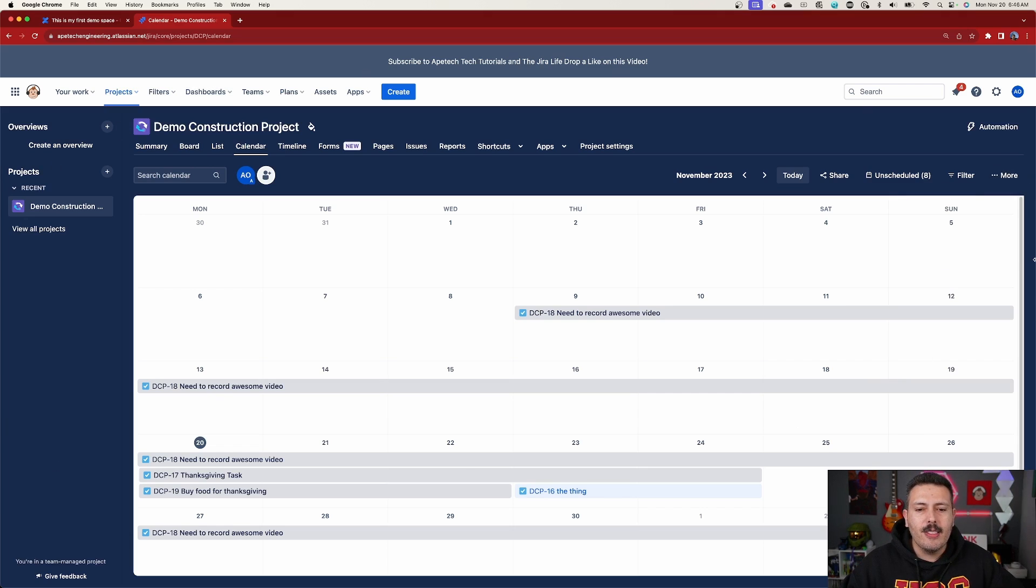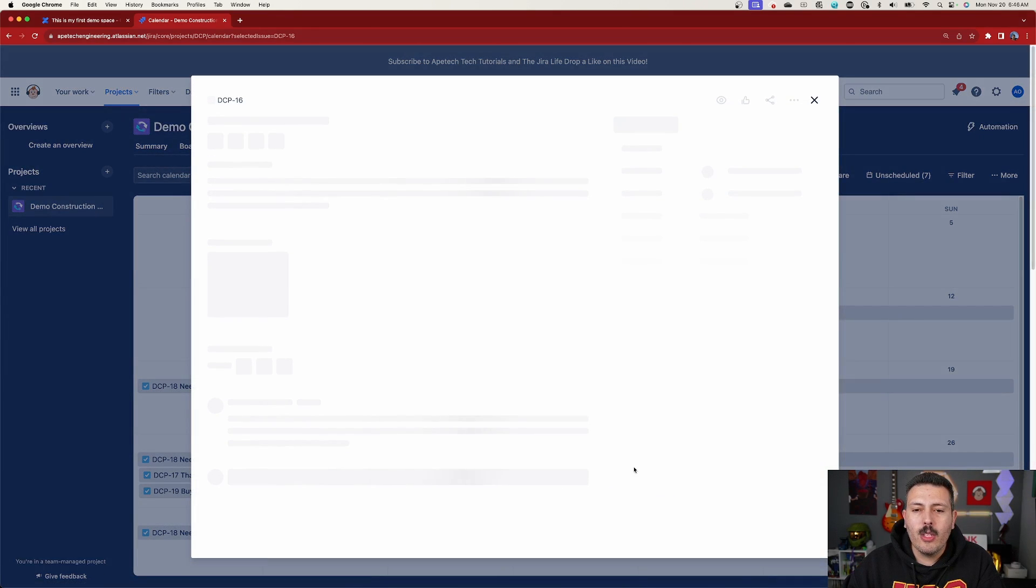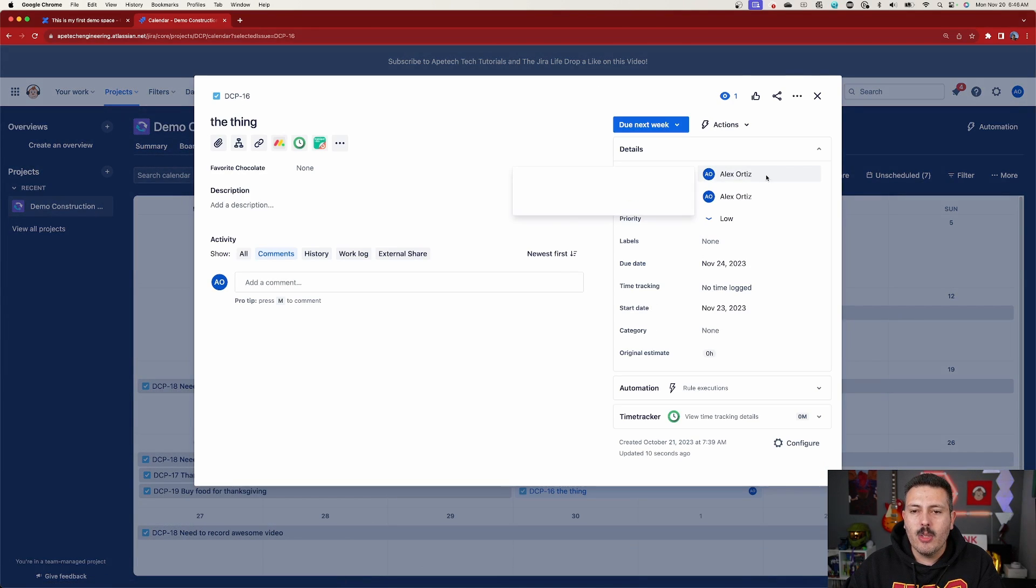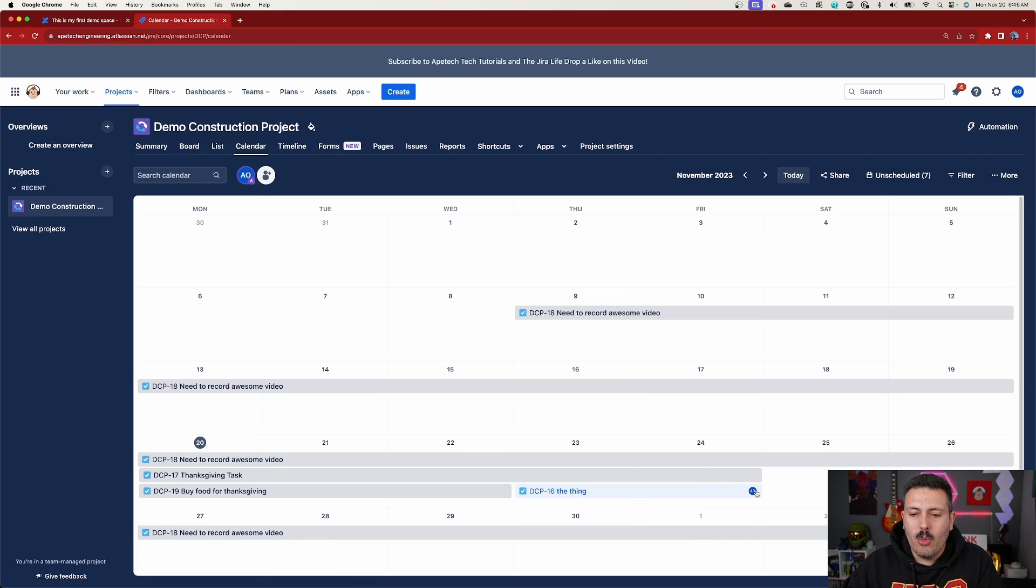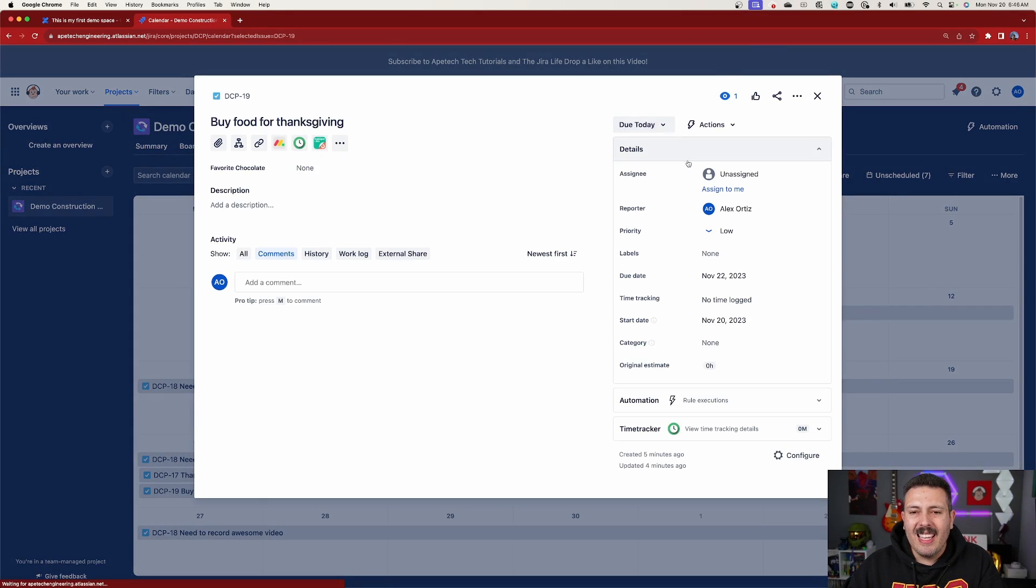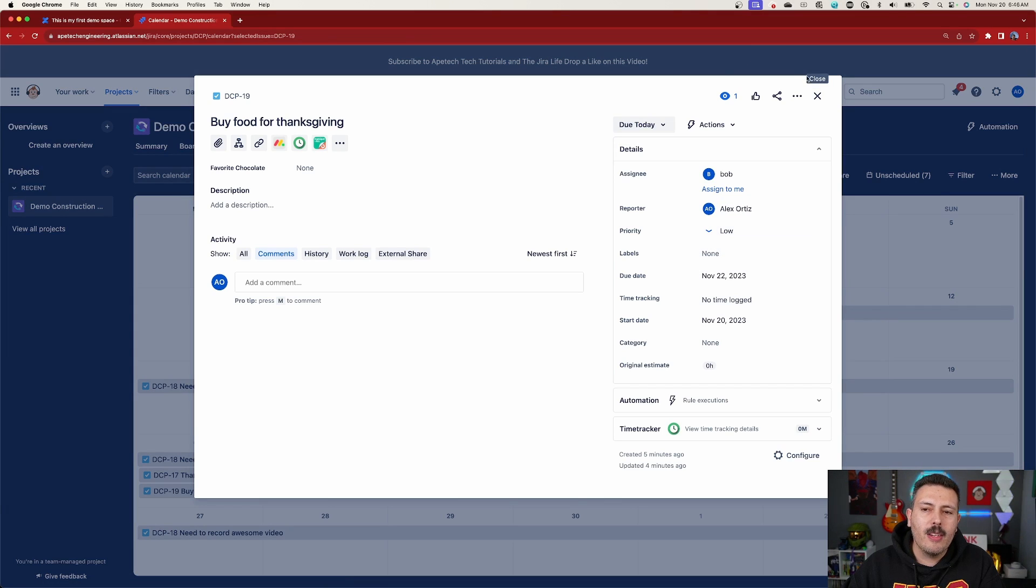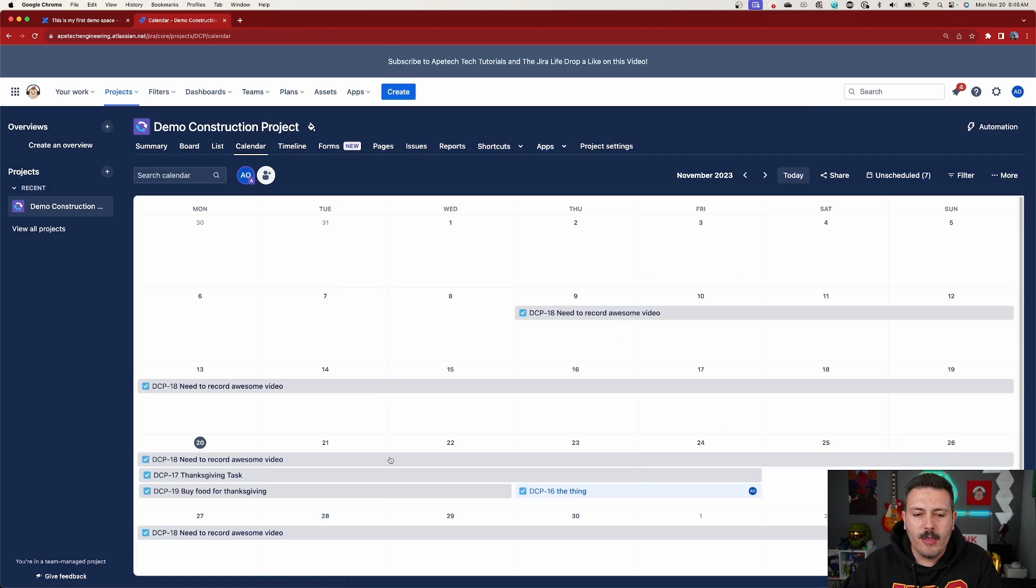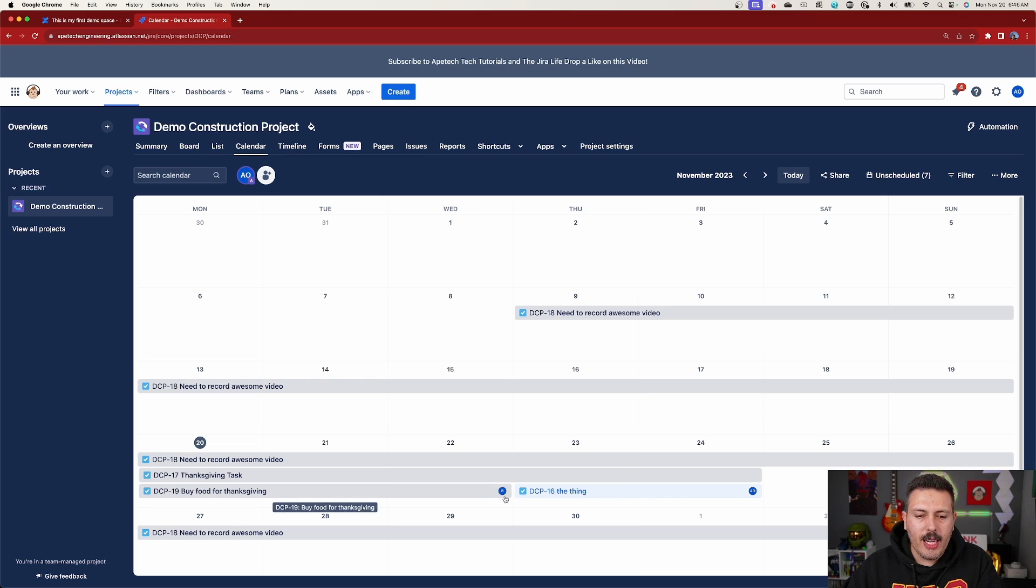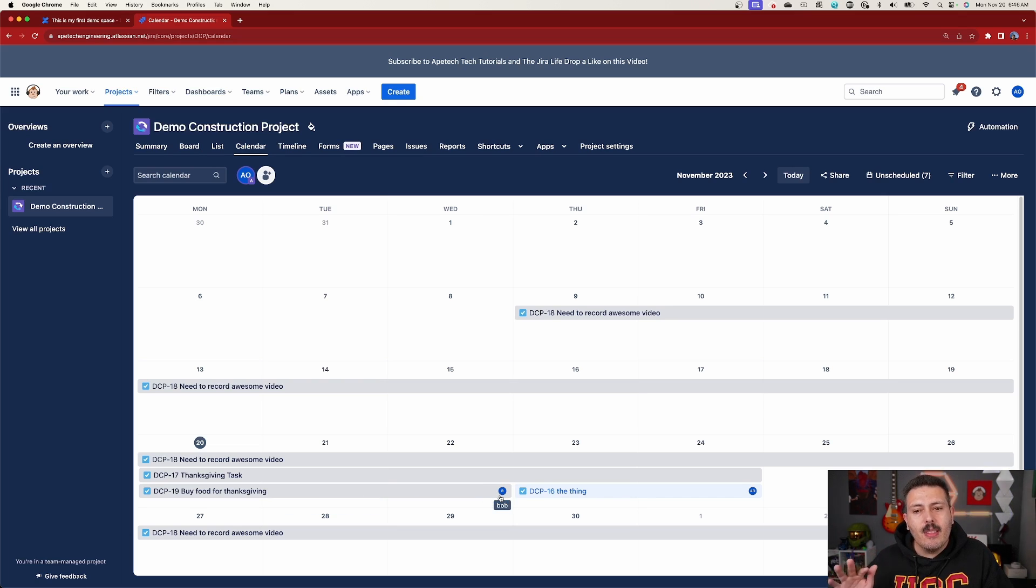And yeah, that's kind of the simple view of how this works. So one of the last things that I want to show you is that when you do take these tasks and you assign it to an individual, like this one's assigned to me, then down here, you will see the assigning of these individual tasks. So again, I'm a team of one, so it doesn't have the same effect, but let's go give one to Bob over here. When we close that out, we're going to see that Bob in a second or two, there's going to be a little B that's going to be created as it is here. And now we can also see at a high level who's assigned what. So what this allows you to do is you, it helps you understand, oh my gosh, Bob's got like 20 tasks that are all due next week. Might want to follow with Bob and make sure that he's on track to get those done or take things off the plate and, you know, move or reshuffle, do something strategic at that point.